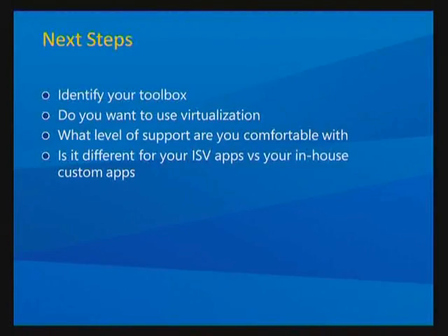This is the one little trick, if you want to call it that, people run up against. We can shim almost any application to make it work. Most, yes. Pretty much. However, if you shim an ISV application and then deploy it in your enterprise, you may not get the support from the ISV to run that application. So what level of support do you need on your applications? If you only have 3 users and you can shim it to get it running, I call that thumbs up. But if it is one of your business critical applications, do you really want to go without ISV support? ISV is your software vendor who created it, like, for example, Oracle.